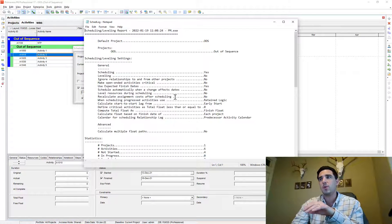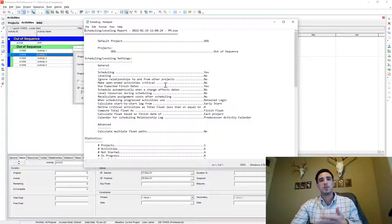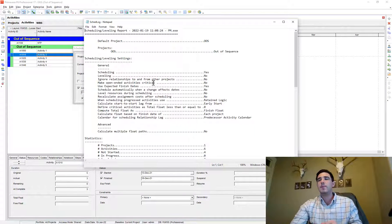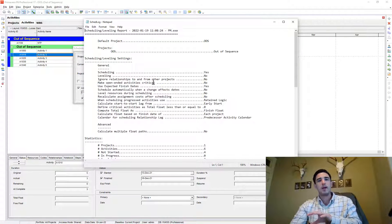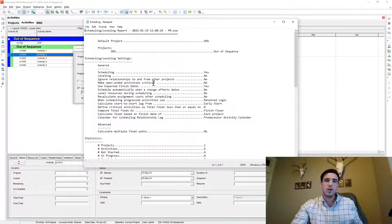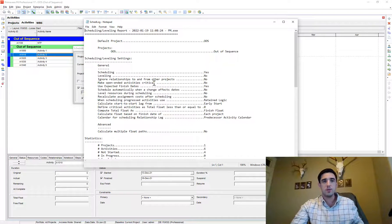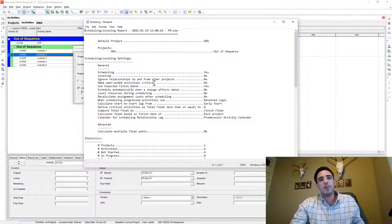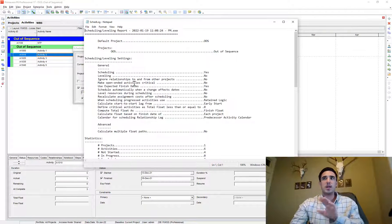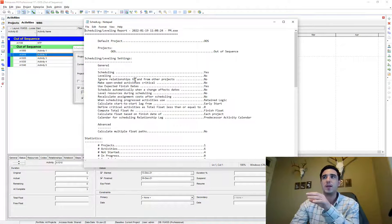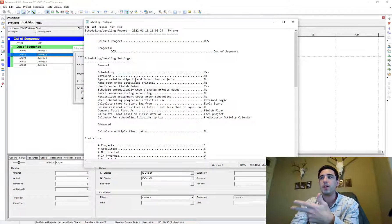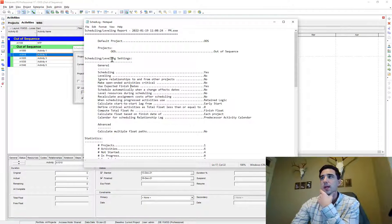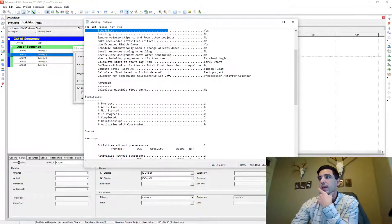And oftentimes what happens is people won't schedule it and they'll just jump to view log. But what they don't realize is that log file is from the last time you actually scheduled your P6 software. So you might have done it on another project and so it might be a different log that's unrelated to your opened project. So make sure you schedule the file fully and then redo it and you go to view log. And this is the new log that gets generated.